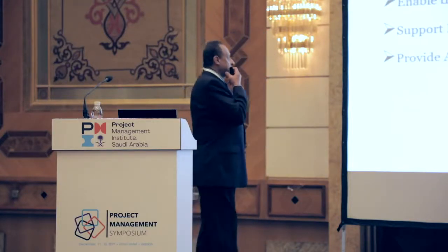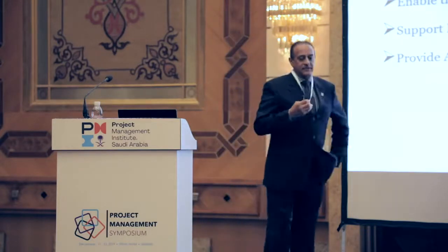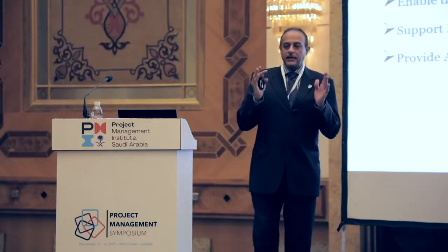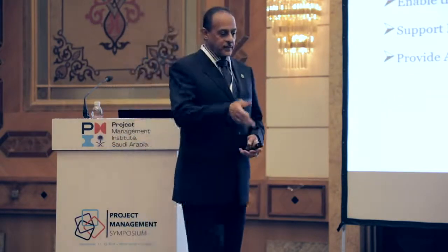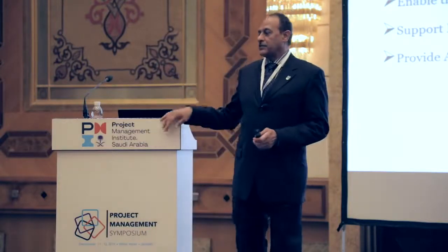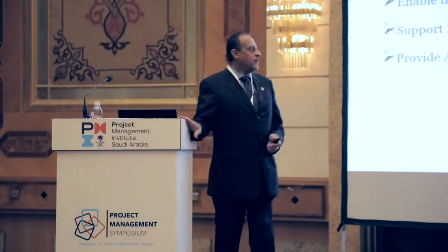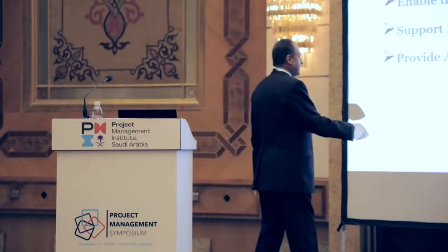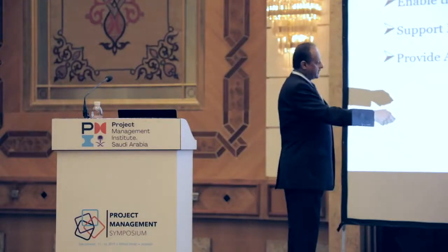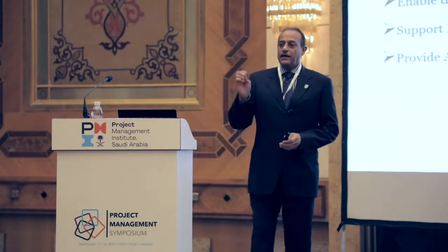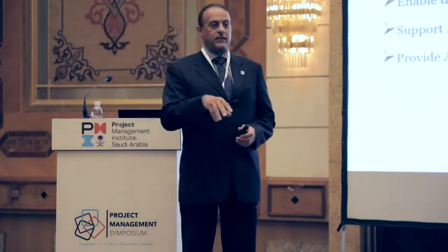Fourth is the gated process. This is basically a decision-making process. So every phase of the project is critical, with certain activities and deliverables. At the end of that stage or phase, there's a decision-making process. In fact, there is a book on mega industrial projects that I recommend reading, by Ed Merrow. He's saying that these gates at the beginning are so important. In fact, the one after the scope is the gate that decides the project go or no-go. In other words, kill the project.